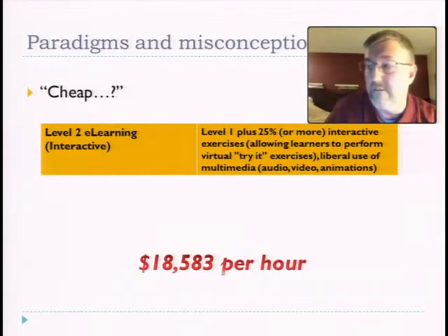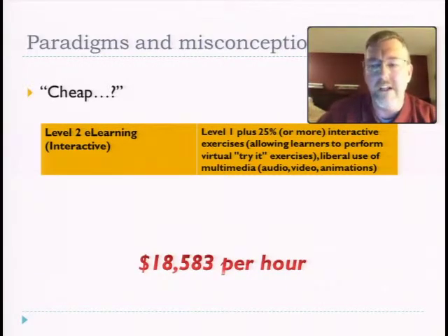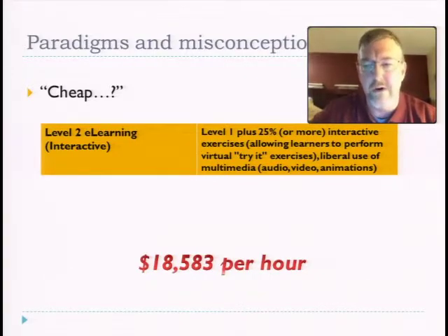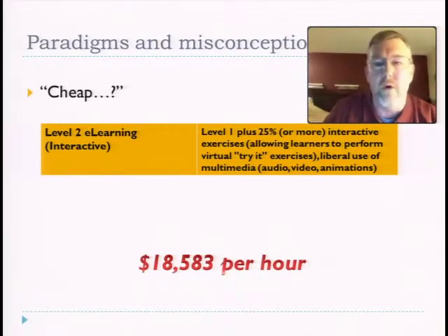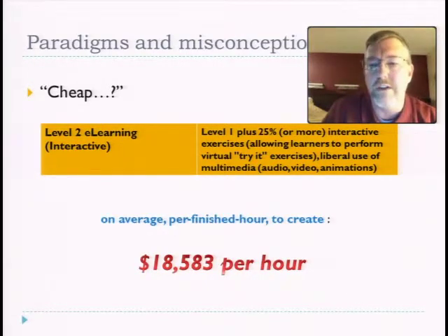And by the way, it's a good spot to mention it, but taping audio is something that instructor-led training doesn't have to do. And in fact, in a lot of instructor-led training that I've been asked to transition, there is no script yet. That's step 1, is just to define on paper what is said on every single slide all the way through in enough detail, and then you go back, wordsmith it, talk to the SME, and get it all straight in terms of a script, and then send it out for audio taping. And that's something a lot of times that nobody even thinks about until they get into the e-learning world. But again, over 18 grand per hour to create 1 hour of level 2 e-learning.